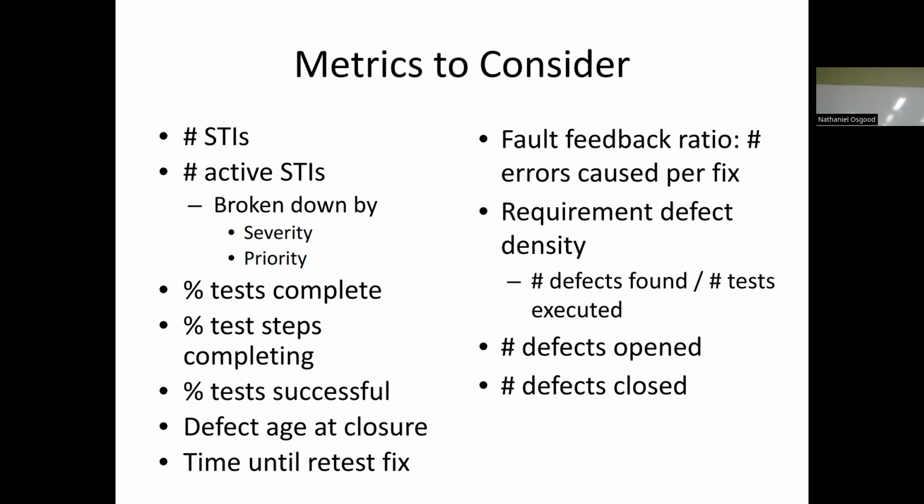A crashing bug is pretty bad, but if there's a very low probability it occurs, or it occurs only on systems you almost never see anymore, right? Under rare occasions, you have to be disconnected from the web and have very little memory left in your phone, because other apps are using it. Only then will you see it. It might be low priority.